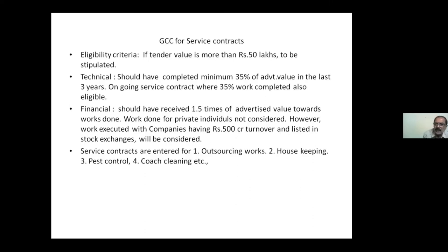Here in this case, incomplete work, service contract work also is welcome. But the only thing is, the percentage should exceed 35%. That is the only difference. And similarly, here it is 3 years, there it is 7 years, qualifying period, technical. Now coming to financial, you should have received 1.5 times, same as in the case of works tenders, works contracts, same 1.5 times of advertised value towards works done.